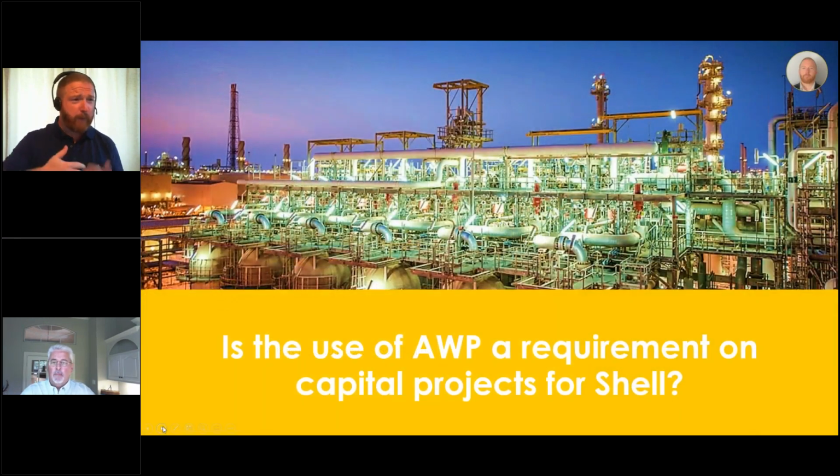So what we're going to do first up is we're going to do a quick Q&A. So I've got a few questions I was hoping to put to you. The first one of those, is the use of AWP a requirement on capital projects for Shell? Well, Andrew, not globally, but the requirements for AWP we have written in our model contract language for all of our projects to use. We like to really assess the projects to determine if implementation of AWP will move the needle on their project outcomes. So some projects just don't have the scope or the amount of man hours compared to the overall project to make a huge impact. Therefore, AWP may not be a consistent approach for it.